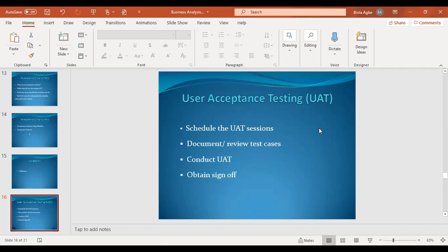Because you are customer facing, you represent them. So the testing and development team should be able to tell you, oh, your product will be ready for testing. Then you need to plan. You need to check the calendars of your stakeholders. Who are the people that need to test your products? You need to know that beforehand. Then you try to arrange that in their calendars.